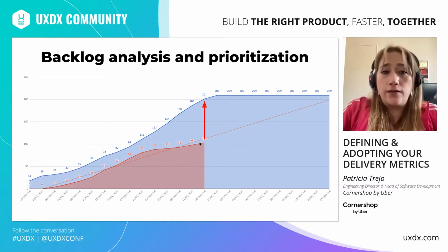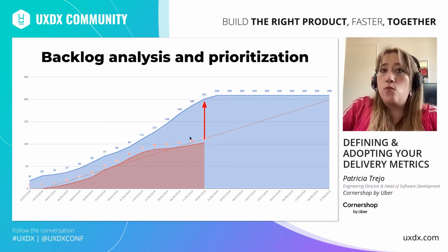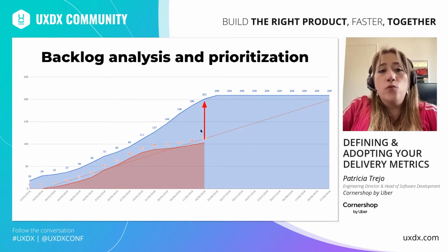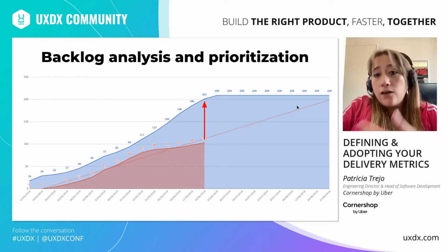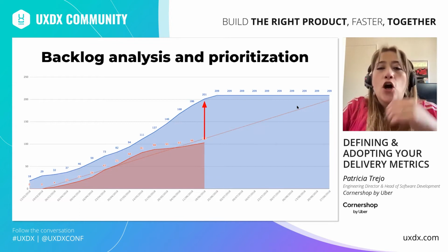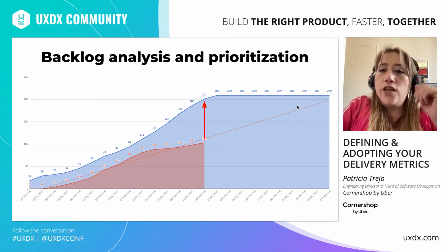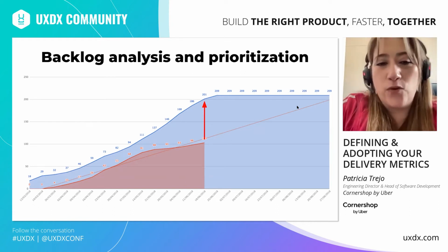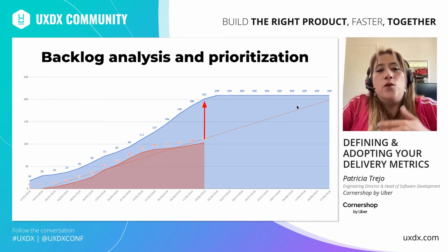In this graph, we have two important insights. On the one hand, the delivery behavior of the team has decreased. It was like, super cool, and now it's a flatter curve. And on the other hand, the backlog has started to grow a lot. Both effects mean that it will take the team a very long time to finish the delivery. And also, let's face it, the backlog always keeps growing. So if we look at it from the perspective of a project, it is possible that it will never finish. Okay, so, what to do?